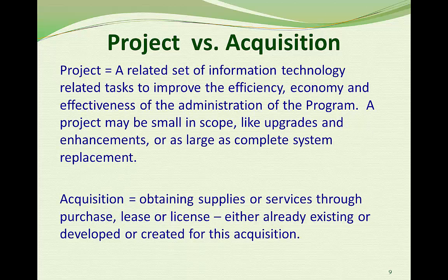It may be helpful to pause for a moment to clarify the difference between a project and an acquisition, and then we'll specify the threshold for each. These often get talked about as if they were the same thing, when they really aren't. A project is the whole set of activities, including acquisitions, that you may carry out to achieve your goal. A project usually involves several steps or phases, multiple milestones, and a management effort focused on reaching the desired outcome. Acquisitions are just a part of that. They are the products or services that you buy within the scope of the project.